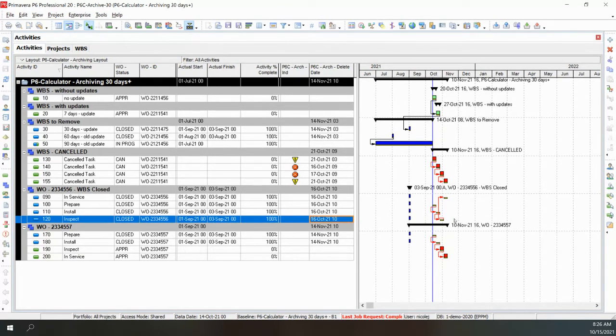Now, in my example, I don't have any cross WBS logic. If you had cross WBS logic, yes, you're going to drop that logic. Okay, but let's keep in mind these are activities that are completed, and an activity that has logic ties off of it will piggyback the data date in any case, right? Well, of course, depending on how you're running your scheduling options, your different options.